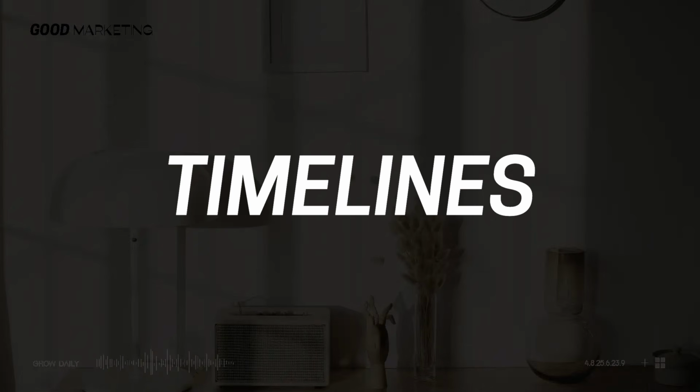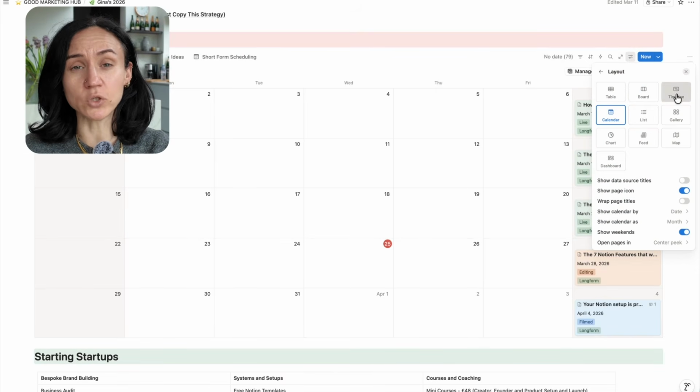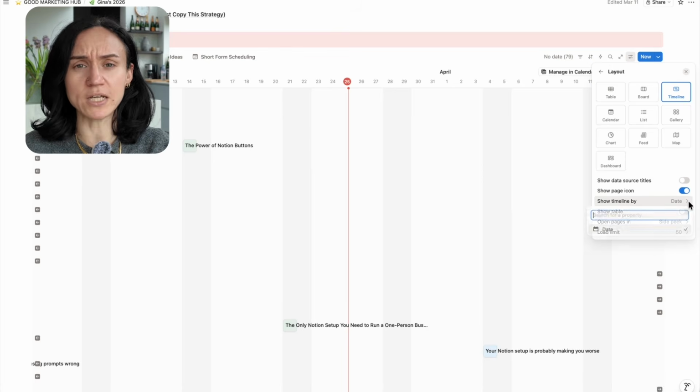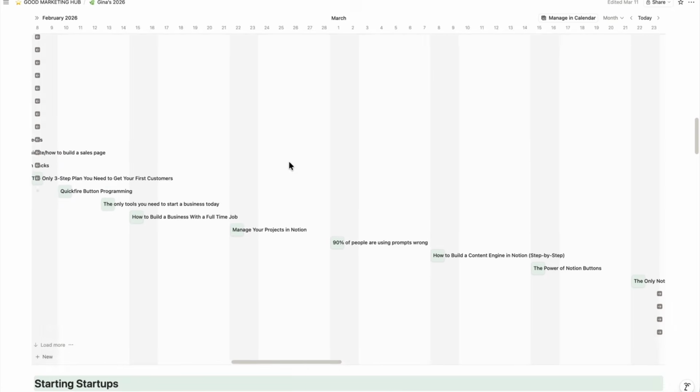Now this feature is really underutilized and ever so simple, but ever so important. This feature will take any board that you're working with and turn it into the holy grail of project management, the Gantt chart. It's actually a dream tool. Simply by clicking here on the settings and adding the timeline view and sorting by due date or whatever date you have, you create this brilliant Gantt chart that anybody in your team can work from.